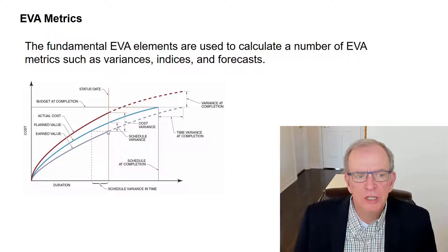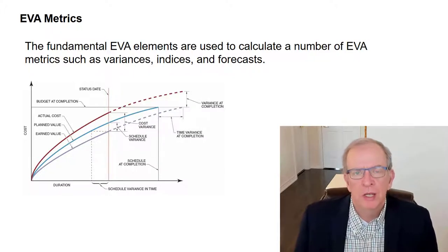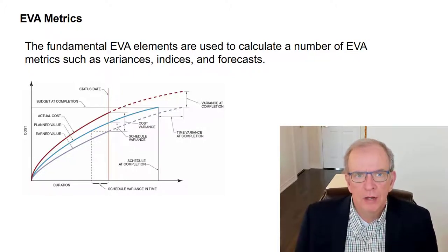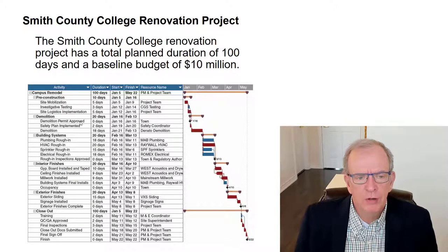The goal is to see trends forming early so that you can take actions to remediate and mitigate those issues that are occurring. On a very large project, you may also change some of the things in the design process that are further along, that may not have to have, but would be want-to-haves at this point. And that could help to keep you within budget if there's no other means of getting back under control, but you want to meet the budget requirements. So there are a lot of things and uses for earned value analysis.